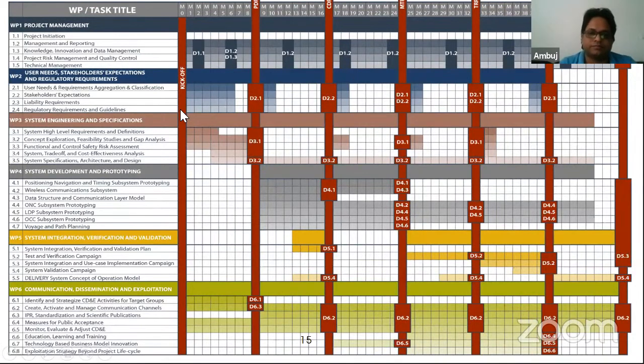Other tasks have certain limited time periods, and they occur iteratively in different time periods. We have divided it into 6, 7, 8 or 9 months, whatever. It is 48 months, so it is a 4-year project. This is how we have distributed our work packages. This is what a Gantt chart means, the clear-cut description of your efforts.